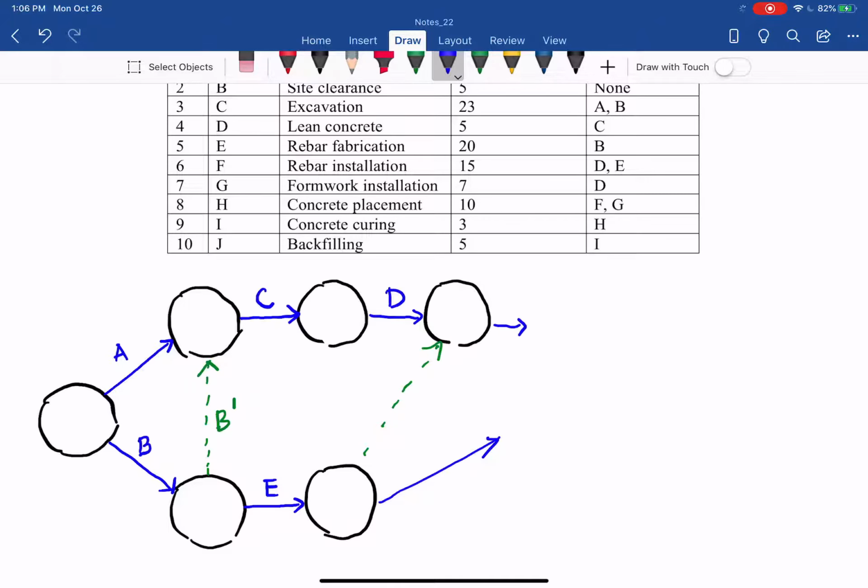And in this case, if you start at D, you still have the problem I had when I drew C starting at the end node of B earlier. You can try that way. But in this case, because G follow B, I avoid that. Instead of F getting out of D, I still use F getting out of E.